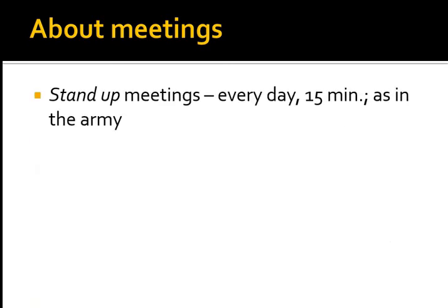About meetings, some remarks. So we can use stand-up meetings, like every day, 15 minutes. I would say that these are my favorite. I mean, the shorter they are, the better they are. If they are stand-up, people do not fall asleep, which is another great thing about them. So they are short, they do not fall asleep, and you don't tell them too many things so they can remember, actually. So this is why they are perfect. So day by day you can assign the task to your people. I know it sounds like in the army, but it might be useful.